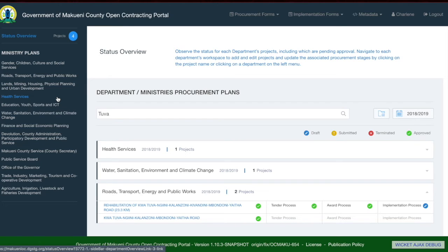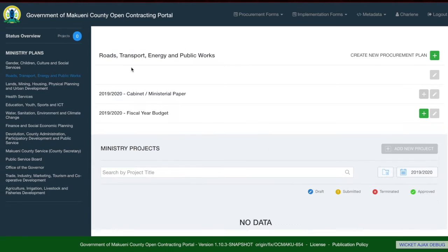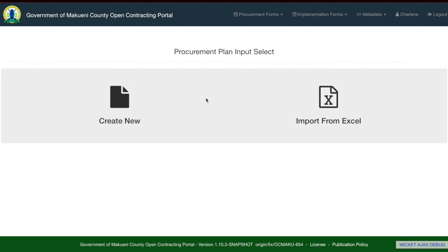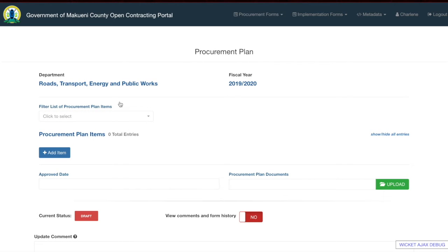We will now move into looking at a particular department. You can navigate there by looking at the left sidebar and selecting the department you want. I will select Roads, Transport, Energy and Public Works. The first step in any department page is to create a new procurement plan by clicking the plus button. Once you click the add button, you will have two options: create new procurement plan, or import from Excel.